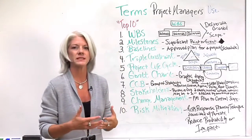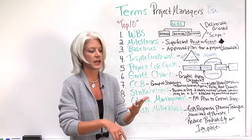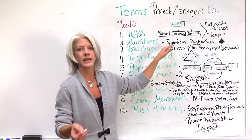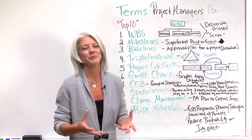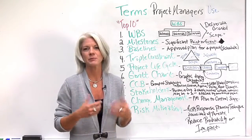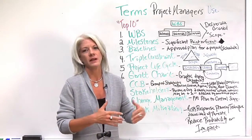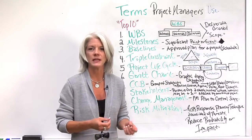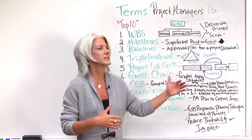During the project, of course, changes are always going to occur: changes to the time, the scope, the budget, and the quality. As long as you take those changes to a CCB, which we'll talk about later, to get approved, they're giving you approval to rebaseline the project, and that's approval to make changes. So if your schedule is elongated, maybe it's delayed for some time, if you get the appropriate approval and rebaseline, to me that again is the difference between a failed or successful project.